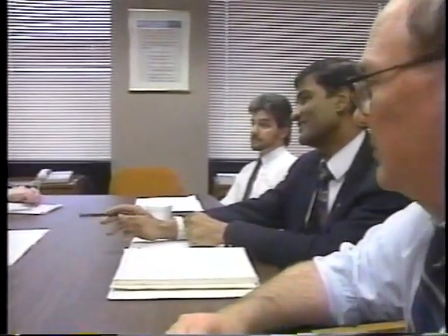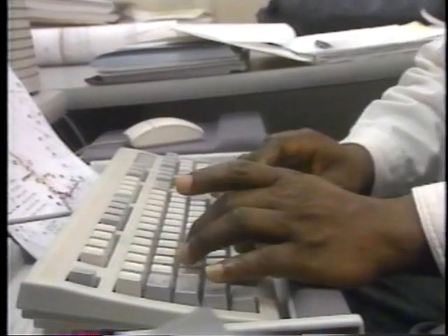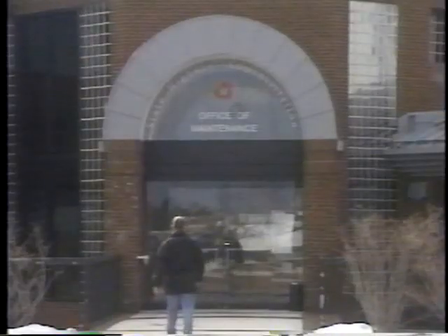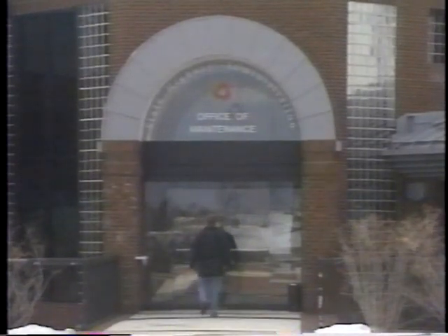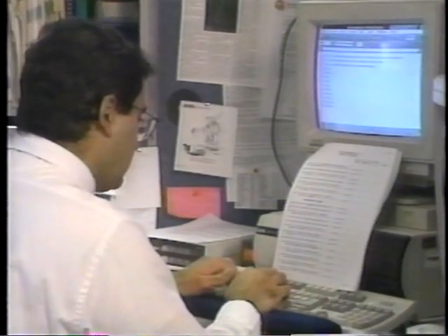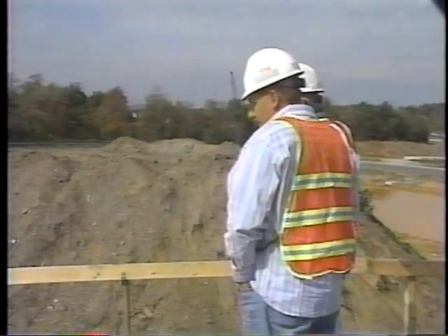The committee's duties include establishing the framework within which the project will be carried out, reviewing and evaluating project progress with special attention to matters that cause delays or difficulties, reviewing and evaluating major findings, analyses, conclusions, and recommendations for completeness, logic, consistency, and practicality, ensuring that the project is fully supported at the central office to expedite implementation, evaluating final system design characteristics, and recommending actions needed for implementation, and ensuring that the system is implemented and supported by the field construction supervisors.